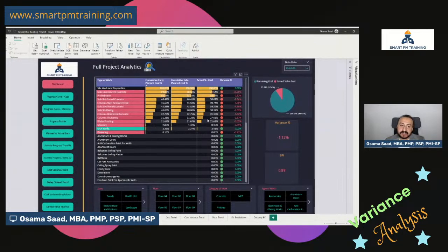I can see the planned versus actual, but I see the figure itself. That's the purpose of this chart. I want to specifically see how much variance regarding concrete. So there is a purpose here, because I want to quantify the delay. Maybe I want to pay close attention to concrete activity or any major activity that has 3%, because 3% variance in concrete might translate to huge cost variance, for example. So I want to look at the figure.